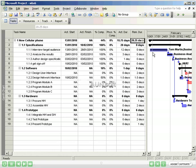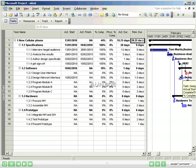A black bar in the task on the timeline view, going all the way across the task, shows that the task is 100% complete. For Design Network Interface, the task is 50% complete, and you can see that the black bar in the task only goes halfway across.